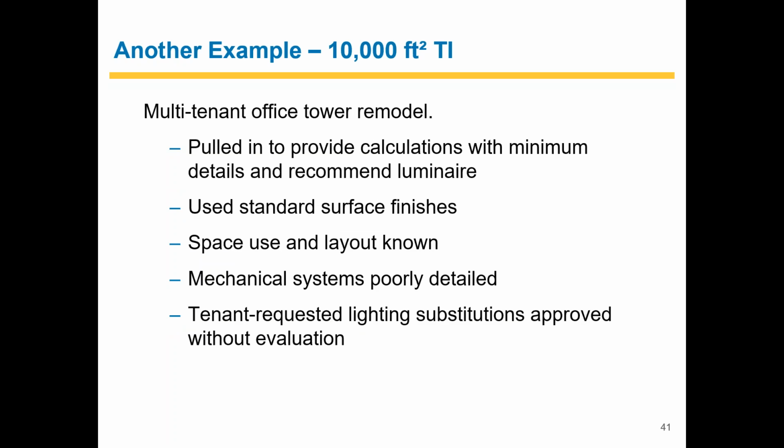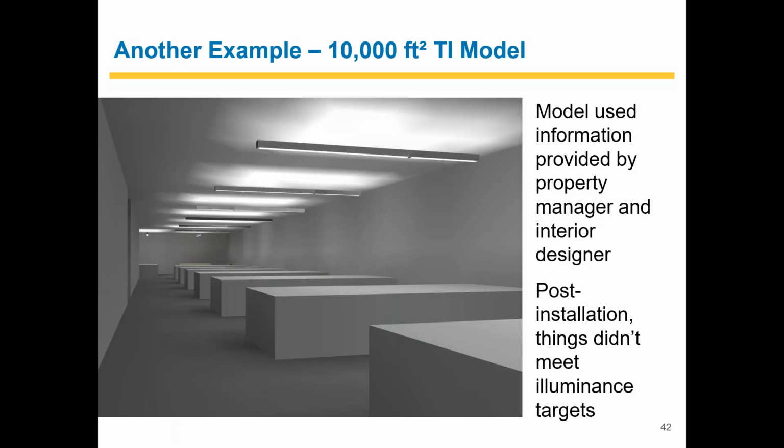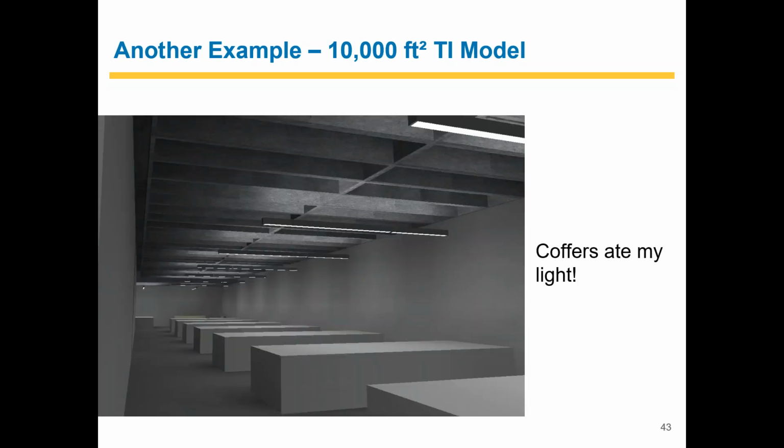This is another quick example. I came in for a customer who was doing a tenant improvement and knocked out a lighting model to say this is how many fixtures you should install. Once it came into post-install, they said the light was not enough. I didn't walk the site. They asked me to do a model over the phone. When I walked the site, it turns out they had a coffered ceiling, these 18-inch deep concrete waffle patterns in the ceiling. And the coffers ate all my light.